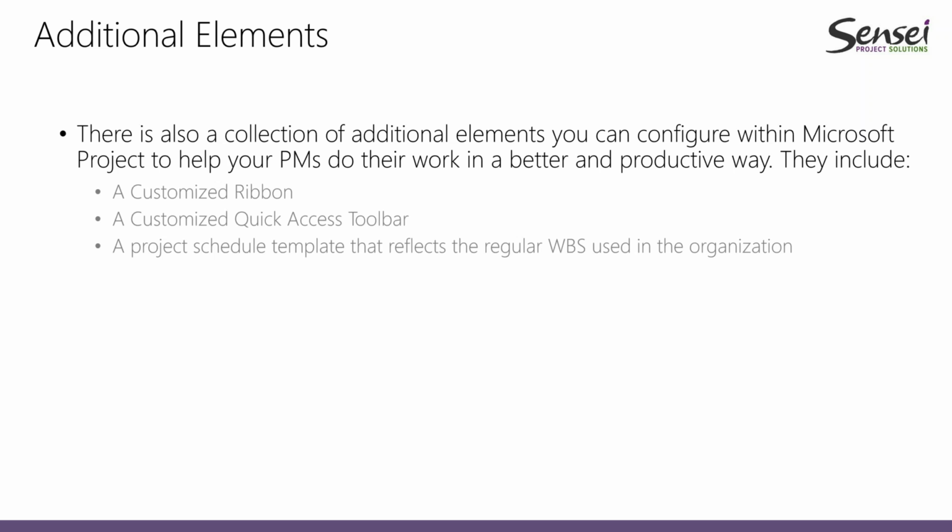So there are some organizations that use, for example, I would say a template with a collection of activities. This is going to be like a collection of activities that will always happen as soon as we are getting started with a project. So maybe we are opening up the project charter, and we are creating the project scope, and we are validating the team, and we are organizing the resources, and we are identifying the stakeholders and things like that, right? We are creating the WBS, and we are defining the scope and things like that.